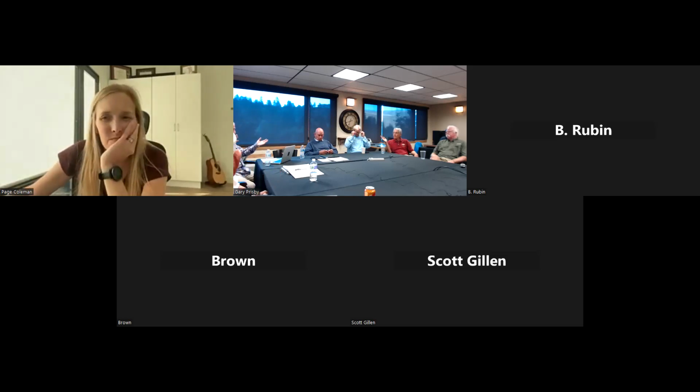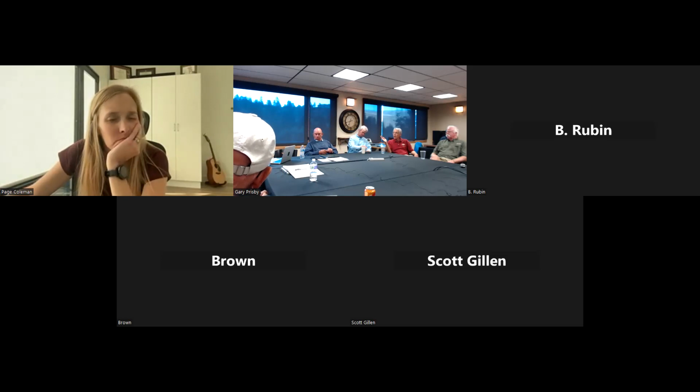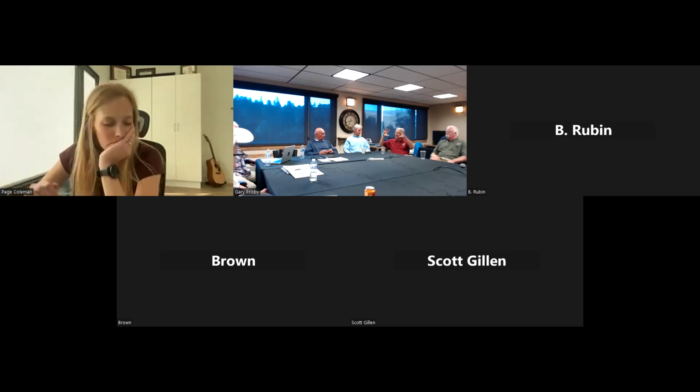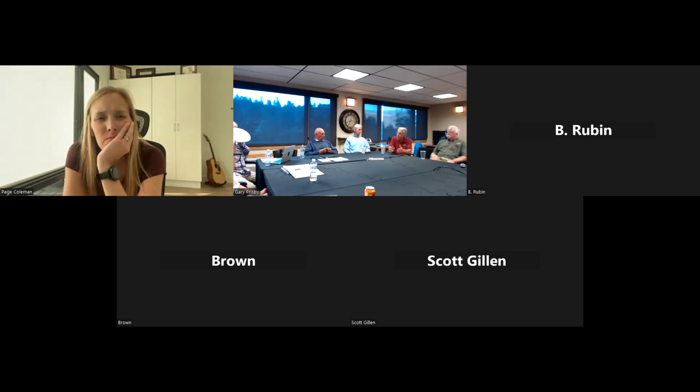People have the opportunity to comment. The way these bids were solicited, it was a matrix; we asked for a matrix of every which way. Once we narrow that down, if we accepted a bid and an option, we may want the roofer who was awarded the bid at the table to ask some questions about the option before we agreed on it. Then the ultimate contract would be tailored to that option, the first one of the four and then the two timing options, all condensed down into one: here's what you're going to do. Take all those other things out of it.